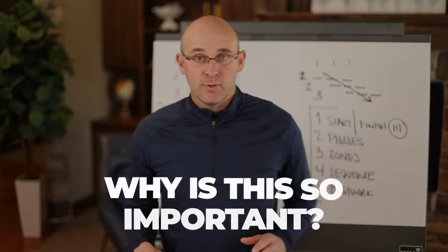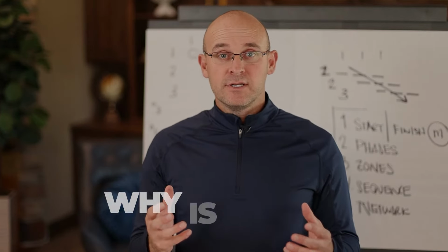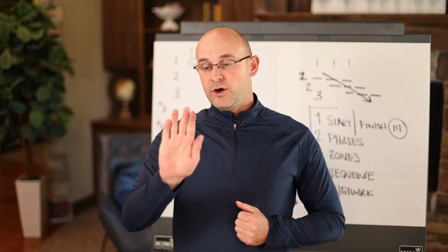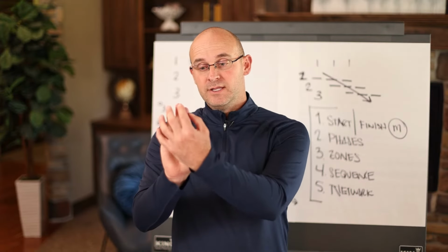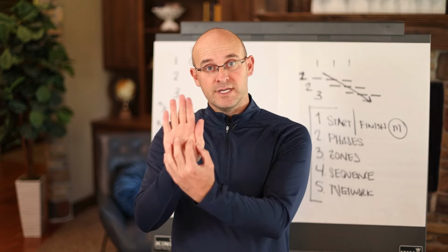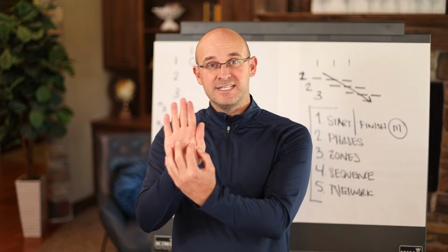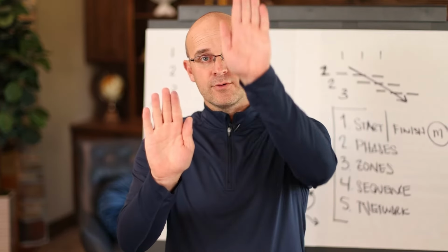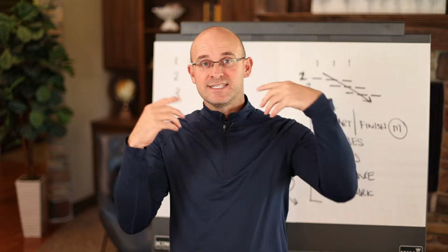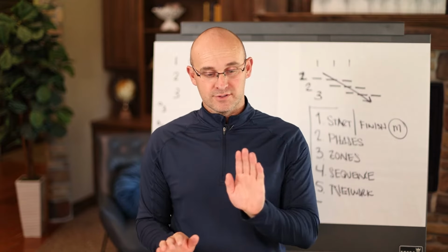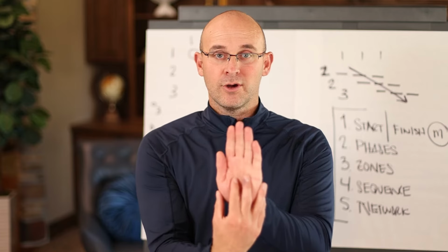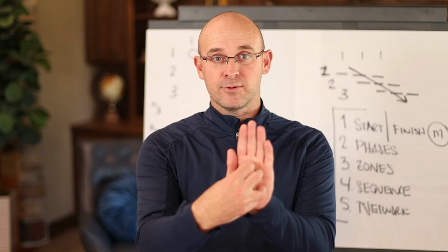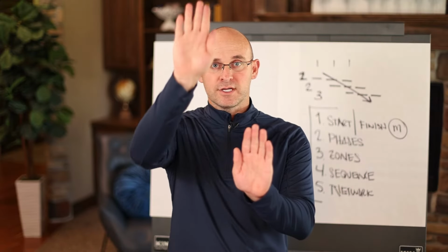So why is this so important? Let me explain this. Let's just talk about a car manufacturing plant. In a car manufacturing plant, the people, the materials, and the tools, meaning the machinery, are fixed. At least the machine is bolted to the floor, and the car moves through the factory. In construction, it's the exact same thing, but in reverse. In construction, the car, or the actual zone in this case, is locked down to the floor. It's anchored with rebar.